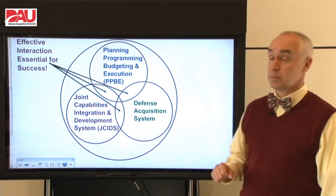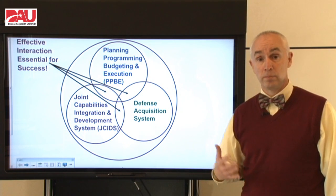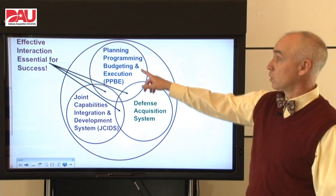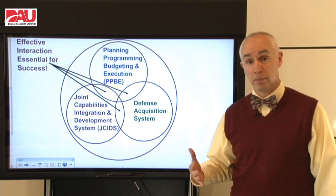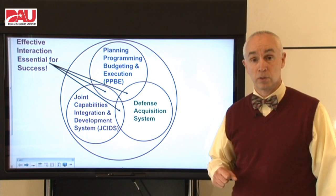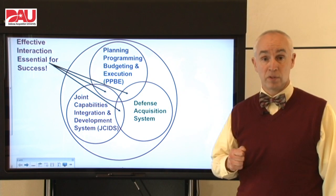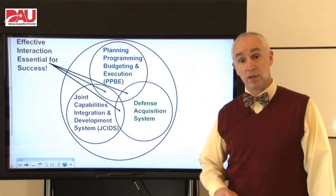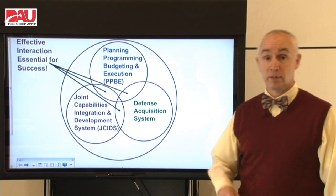The Defense Acquisition System cannot operate properly unless it has good interaction with two other major defense support systems: Planning, Programming, Budgeting, and Execution, which is how we get our money, and the Joint Capabilities Integration and Development System, which is where the users, the warfighters, document their requirements or their capability needs. So we're not going to start a program unless we have a capability need, and we're not going to have a program unless we have money.